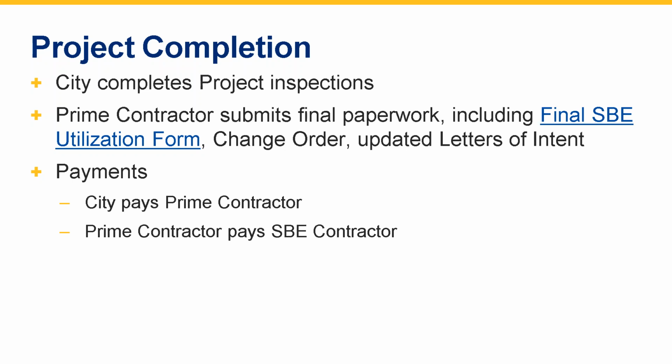The changes should be submitted with each pay app or notification as soon as you know that a change is going to occur. If for some reason there is a sub that cannot fulfill the job, if they are busy or tied up on another job, and the intent is to change, we need to get that change request notified prior to doing any of the work. And then update and notify letter of intent with each pay app.